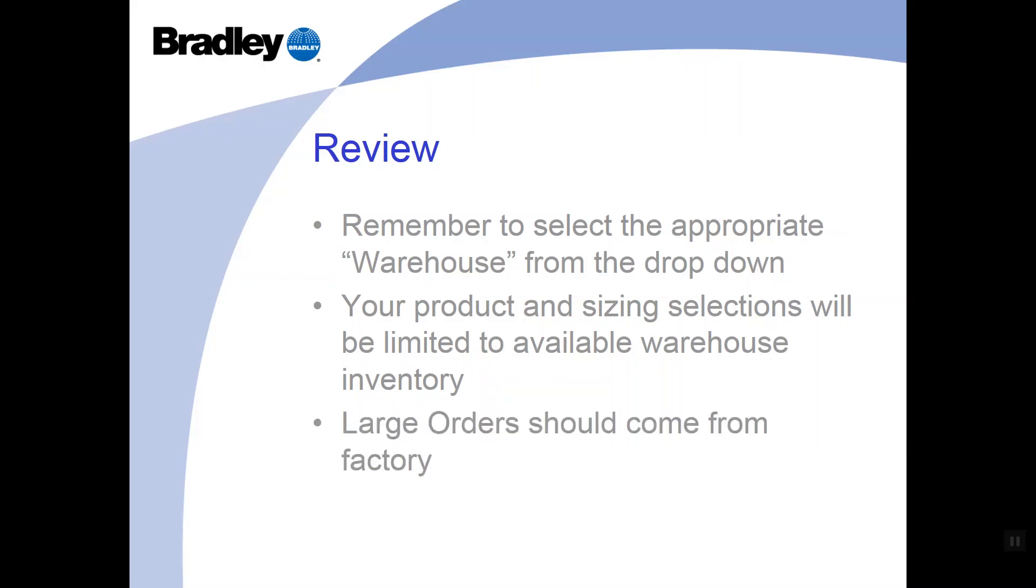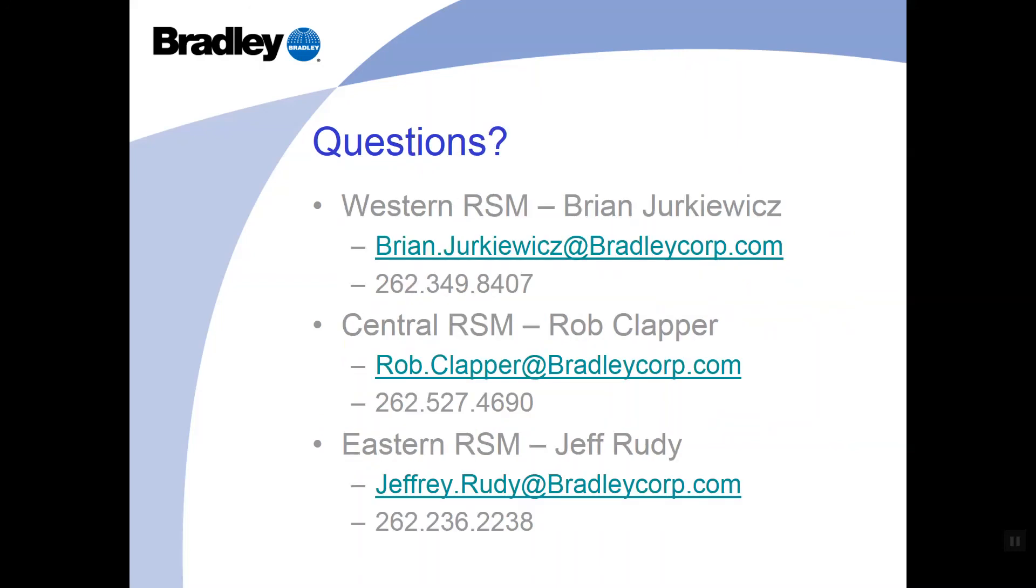And finally, large orders should continue to come out of that Ohio location whenever possible. The Ohio location is where we manufacture everything out of. That has all of our standard lead times. Typical regional warehouse orders are 25 stalls or less. If you have a large project that is time-sensitive, please get with your local sales rep immediately so that we can work towards some other type of solution.